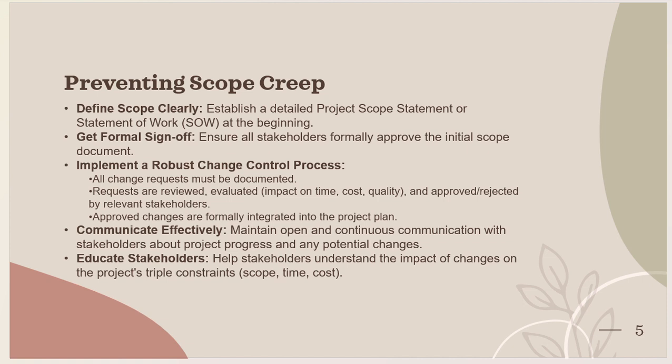We always take sign-off from the client whenever changes come, and whenever the documentation is completed, either by email sign-off or document sign-off. Mostly email sign-off happens in organizations. Then implement change control: all change requests must be documented.